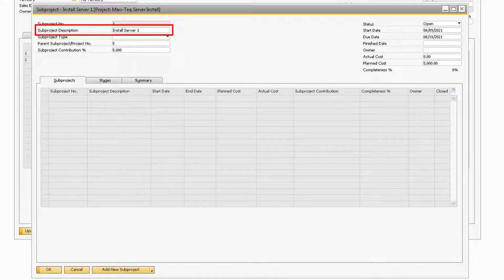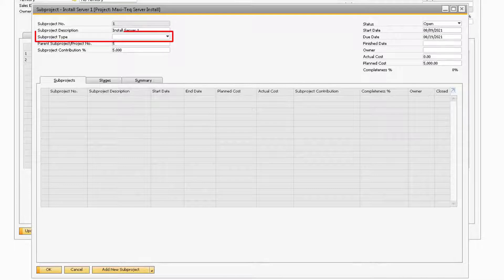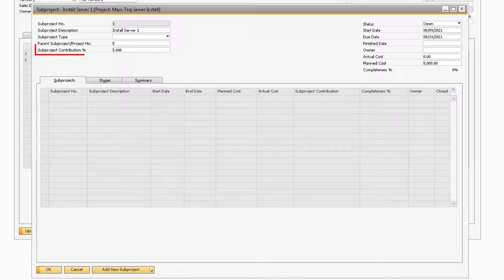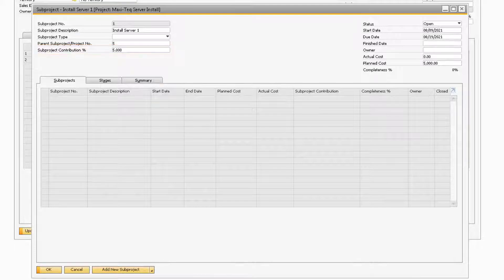The Subproject Description field acts as the main project name for your subproject. You can also assign a specific type to the subproject by selecting a value in the Subproject Type drop-down. The Parent Subproject slash Project Number field will indicate the project number for the parent project or subproject. Next, in the Subproject Contribution Percentage field is where you can indicate how much of the total project this subproject covers. For example, if a subproject is planned to cover 25% of the parent project, then you would enter in 25% into this field.